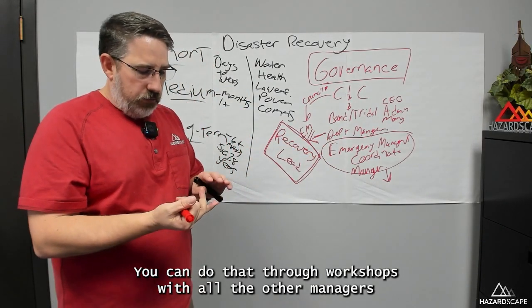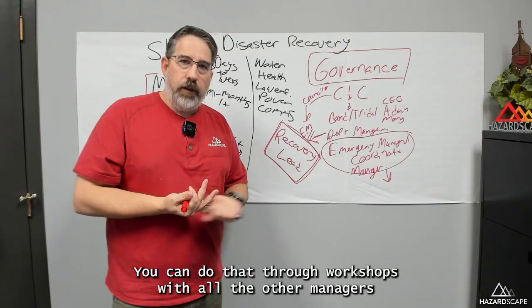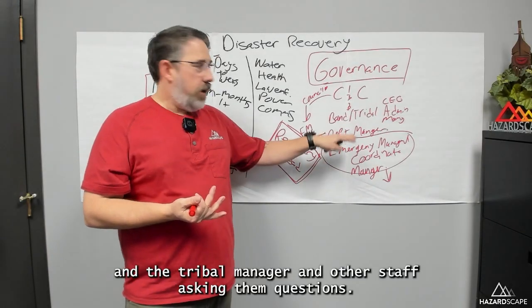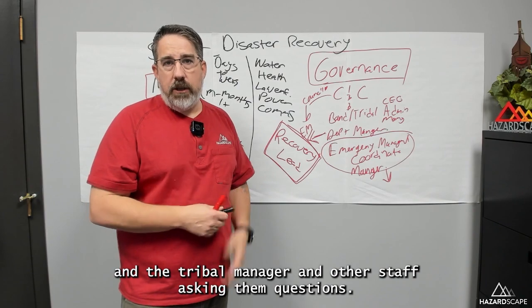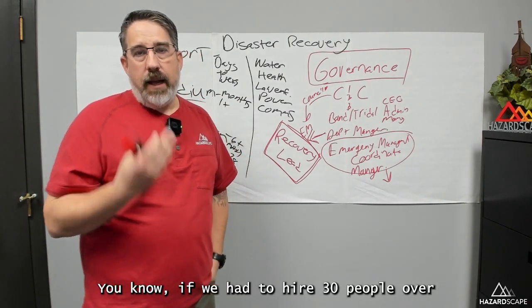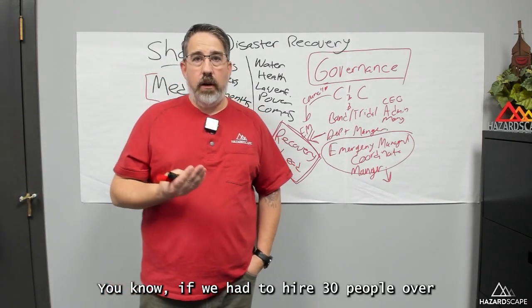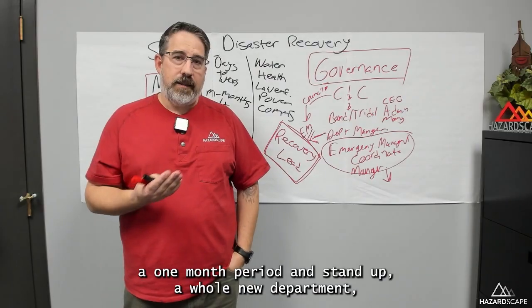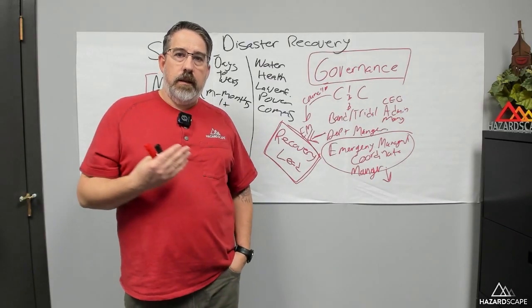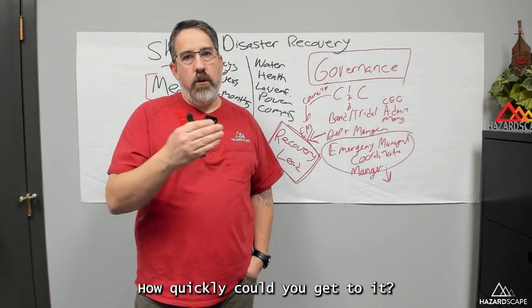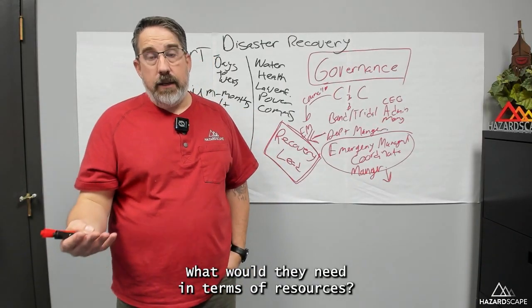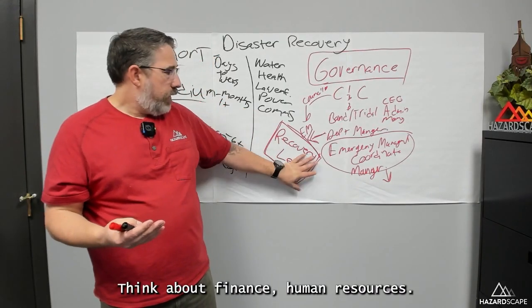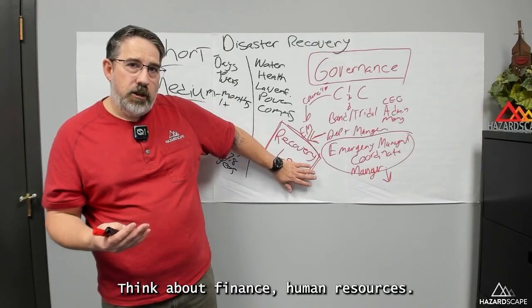You can do that through workshops with all the other managers and the tribal manager and other staff, asking them questions. If we had to hire 30 people over a 1-month period and stand up a whole new department, what would your role be in that? How quickly could you get to it? What would they need in terms of resources? Think about finance, human resources.